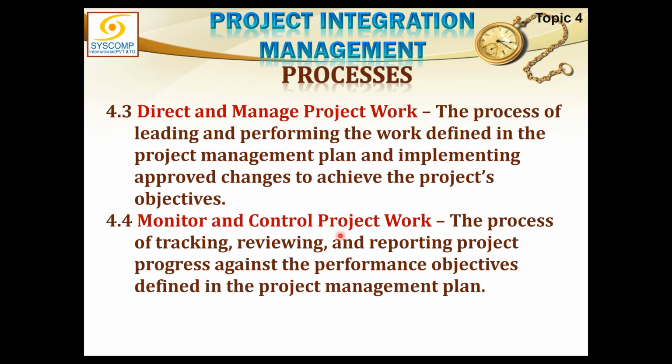All the authority to make changes to a plan is held by monitor and control project work, and there is a complete procedure defined there for how we get to that. So monitor and control project work, along with its subordinate controls of all the various knowledge areas, is the process of tracking, reviewing, and reporting the project progress against the performance objectives defined in the baselines.